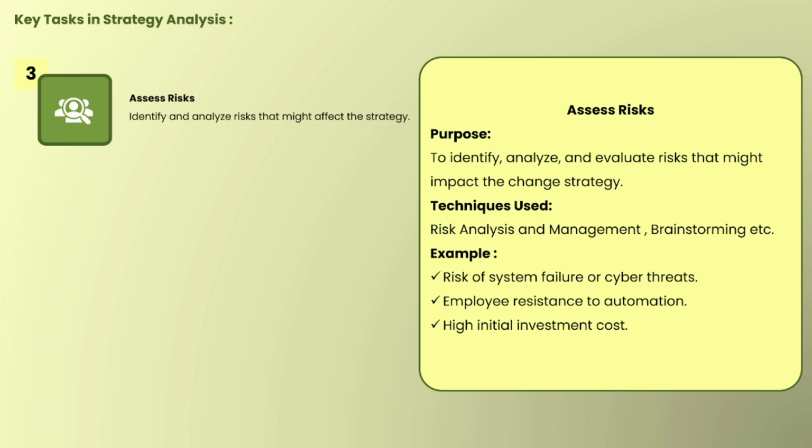Once we have identified the risk, now we will analyze it. How to analyze? Well, downtime is considered moderate, meaning its likelihood is fine; such things can happen. Downtime can happen. The system server may get slow at some time and crash during busy hours. It might happen if servers are weak. It's normal, but the impact is high, that could really mess up loan approvals. So the impact is high, but it can happen. In this way we can analyze the downtime.